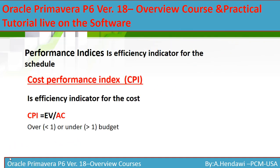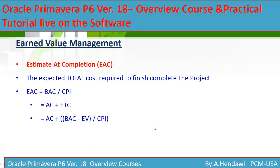The Cost Performance Index (CPI) is an efficiency indicator for cost — anything with a C means cost. CPI equals Earned Value over Actual Cost. If it is less than one you are over budget; if more than one you are under budget.